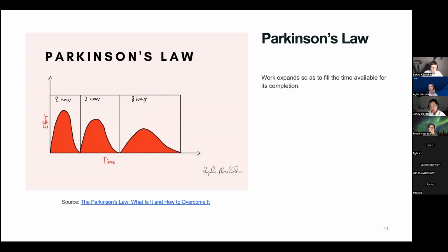And then the last law I'll go through is Parkinson's Law. Work expands to fill the time that you give it, basically. And so this is why Ricco was talking about constrain your cycles. You need to have some sort of format so that you achieve your goals within some period of time. And the reason why is because people will use up all that time. And so this is not to suggest that you need to do 1 month OKR cycles. That's mental, right? Because you have to coordinate probably across teams. If you're really doing this well, you're doing cross-functional stuff.